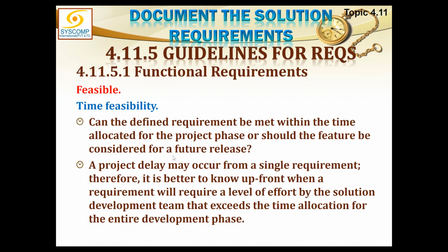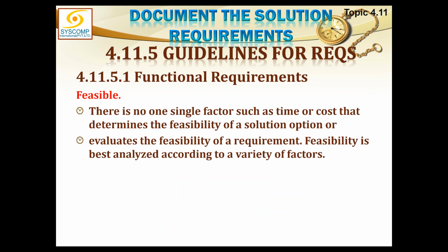Then there is time feasibility. Can the defined requirement be met within the time allocated for the project phase, or should the feature be considered for a future release? A project delay may occur from a single requirement. Therefore, it is better to know upfront when a requirement will require a level of effort by the solution development team that exceeds the time allocation for the entire development phase. So if you find that one of the requirements can delay the project, you must take action accordingly, maybe through a change request or whatever.